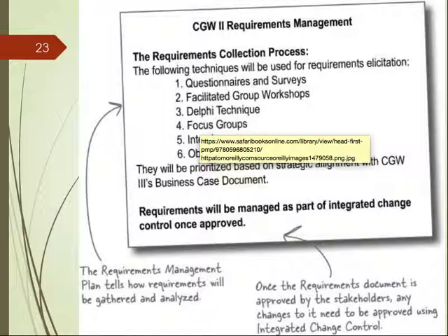And then the Delphi technique would allow them to write independently. And then once everyone is done, they flip their answer open and show each other. So if some people say it's 3 days, some people say it's 4 days, then they try to discuss and then perhaps independently make another guess. The main thing of the Delphi technique is that you make your guess independently.